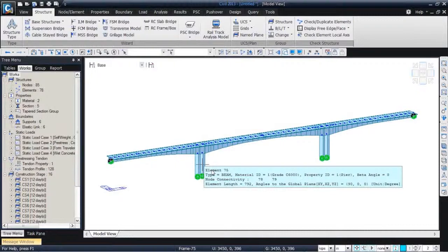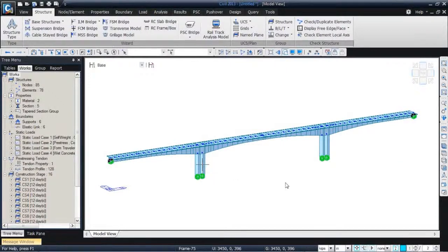Now, construction methodology selection also depends a lot on the labor cost and the time invested, and the nature of site and the usage of the under bridge area. So depending upon those factors, the client usually recommends or puts forward a particular type of construction methodology, and unless there is some significant saving or some other specific requirement, the construction methodology mainly remains more or less the same.